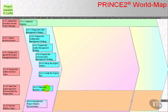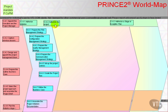Then refine the business case by using the costs and timescales from the Project Plan, and then assemble the Project Initiation Documentation. Combine that with the end stage report and the next stage plan from the stage boundary activity that will occur at the end of this stage, and ask the question: can we authorise the project and can we authorise a stage or exception plan?